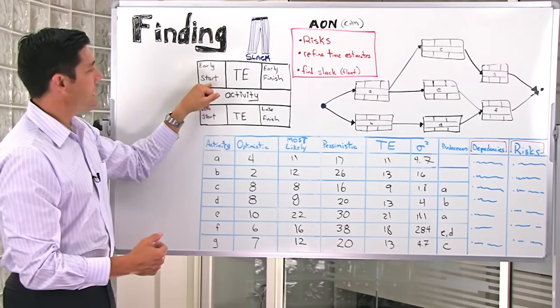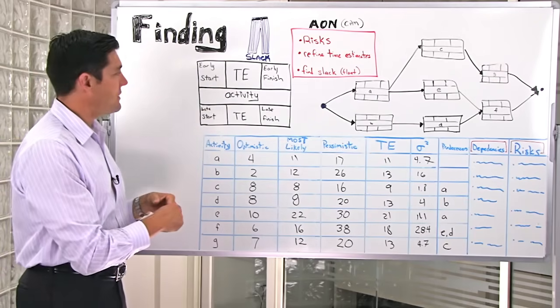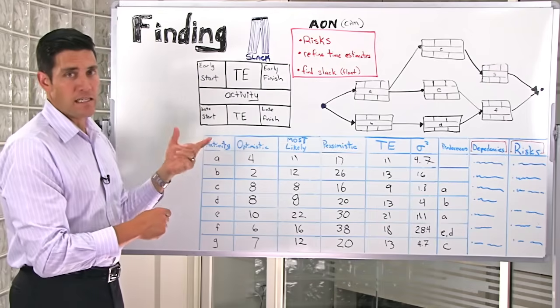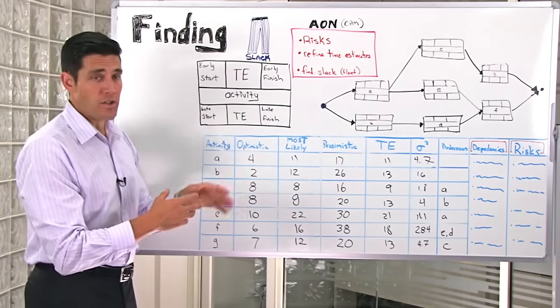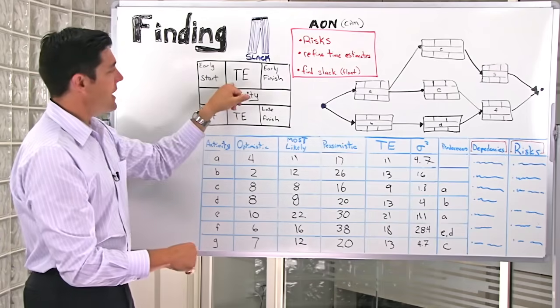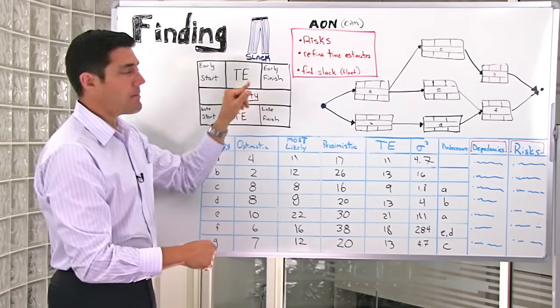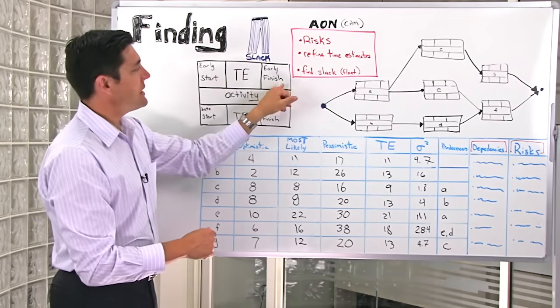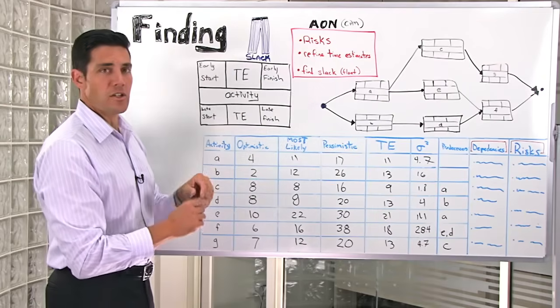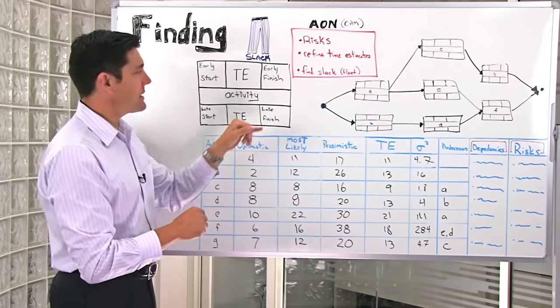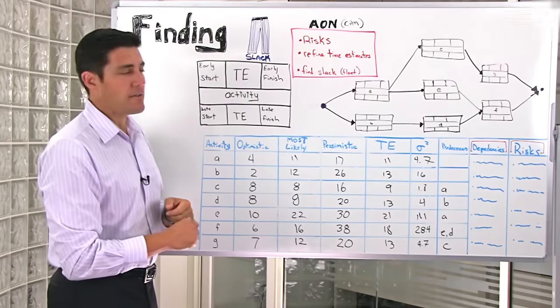Let me explain these different areas. In the top left part of the Node, we've got the early start of that particular activity. That's the earliest time that activity could start going through the project in a forward pass. Then we've got our expected time for that particular task, and we list the early finish. The early finish is simply the early start plus the time expected, and you can calculate the earliest finish.